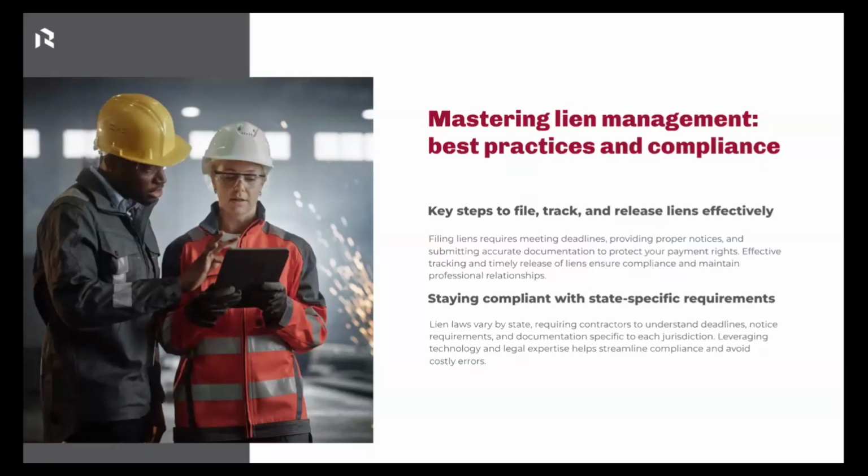Legal language, right? Another important aspect. If you miss legal language, it can definitely cost you. If you're missing the key state mandated disclosures, then this could be ruled unenforceable if you've got a lien dispute. So these are big things you want to make sure that you do. So some things you could do, right, are keeping state by state references. I know a lot of contractors who will do that. It's tough to keep those updated. There are software tools out there as well that will keep track of the latest state requirements. And so this is something you could do and then update those forms in Red Team Flex. If you're using it, make sure those forms are always up to date.